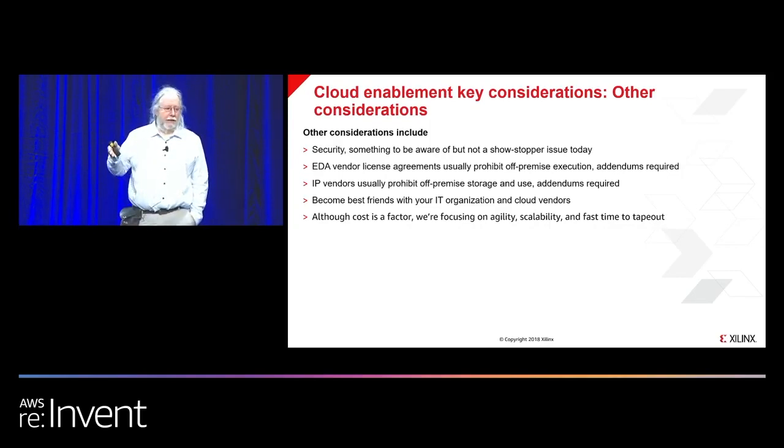It can take you easily 2, 3, sometimes 4 months to get a batch of servers in, plumbed into the farm, configured and ready to run a job. Typically that's way too late. So you end up in this unfortunate situation of having to predict hardware needs to deal with surprises when you don't know what the surprise is.